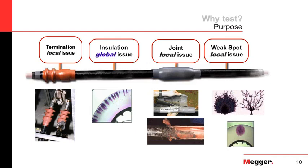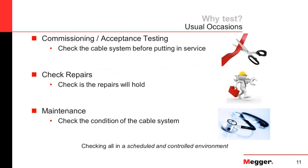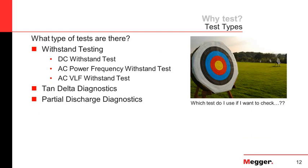When it comes to testing, there are three different occasions. The first is commissioning — checking your cable system before you put it in service. Someone could have done a repair, and you're checking to see if the repair will hold. And then of course there's maintenance testing, which checks the condition of the cable system. There are various types of tests: DC withstand, AC power frequency withstand, AC VLF withstand, tan-delta diagnostics, and partial discharge diagnostics.